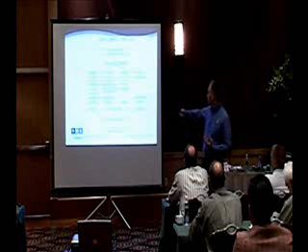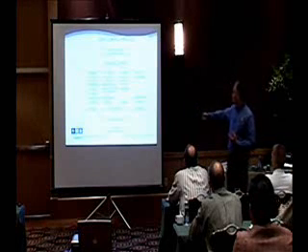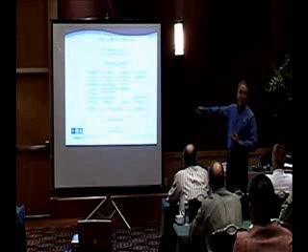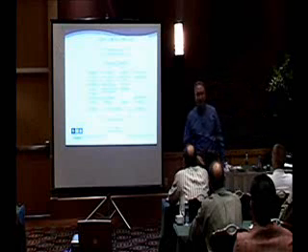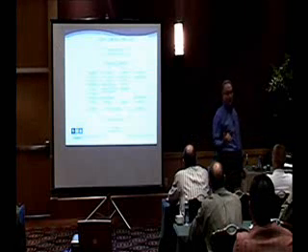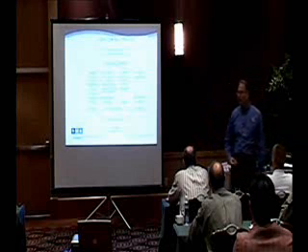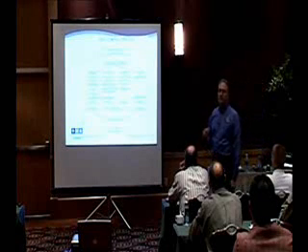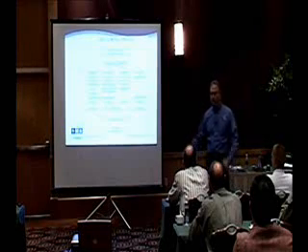Purchasing, same thing. We can't buy the stuff correctly. And scheduling, that comes in, and we had standard schedules. Well, the standard schedules are based upon what type of product lines you might be offering, or in a custom environment, what house. Maybe your schedules are established based upon the size or scale of the house, or individually house by house by house. You get together with your construction management team and you figure out, this particular project or house is going to take us 210 days to build. This one should take us this, and here's the schedule.